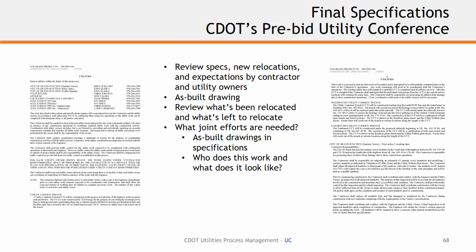I would say it's probably almost a 50-50 shot sometimes, because of the nature of where we're at. It's really tricky sometimes to get that stuff moved ahead of time. But it's looking at it all the way through the process and then determining what the advantages of phasing early or phasing during construction or both. But regardless, having that construction management team, at any stage, is really important for gathering and managing that data and managing the notifications in the specs, what's to come, letting the contractors know you need to provide notice to whatever utility company it might be. They're 30 days out, they're 45 days out. Right. So there's a lot of advantages.